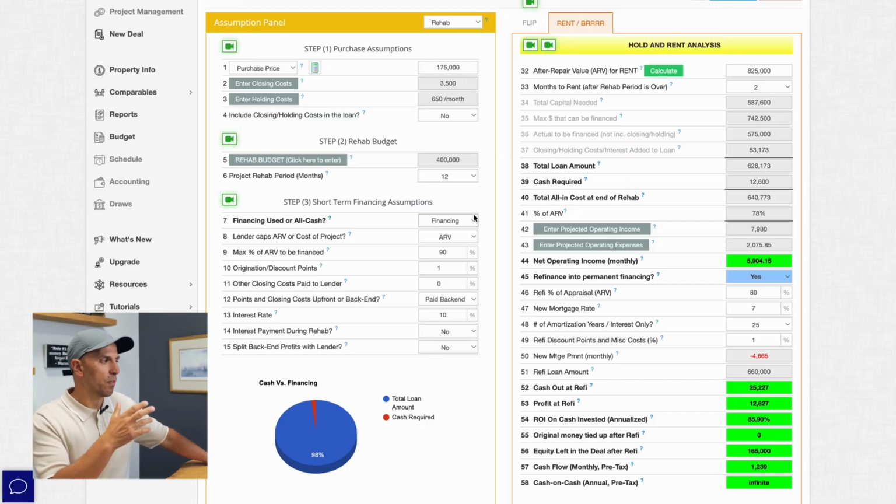Once you do that first one, then it gets easier because the lender will fund you, right? Anything that you put in for that first period of time, you take that money and then you keep paying your contractors to move the project along, you request the second draw, the third draw, and so forth until you are done. So for a project of this size, you only need somewhere between $40,000 and $60,000, I'd say, to get started. That will get you through rough inspections, demo, framing, and mechanical deposits, right? The 20-25% deposits that you've got to pay all these guys to get started, at rough inspection you get the hard money lender in there, and you get reimbursed.